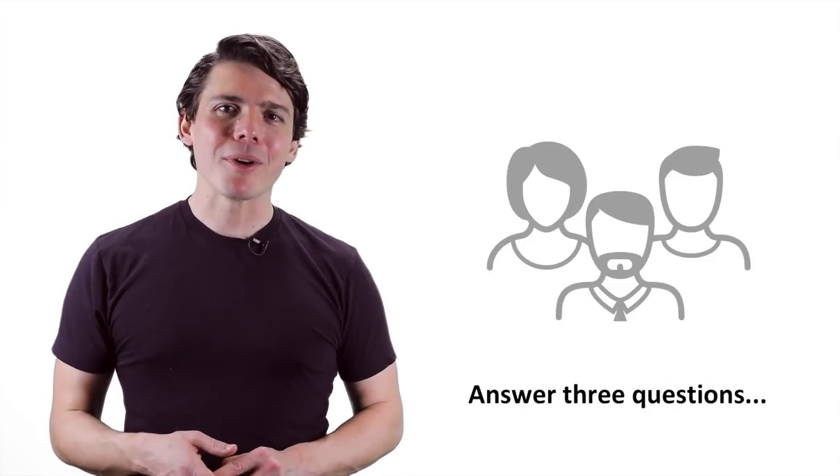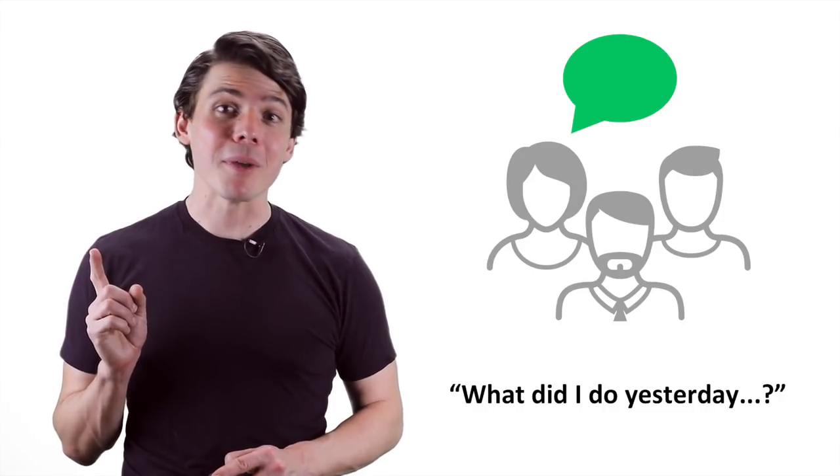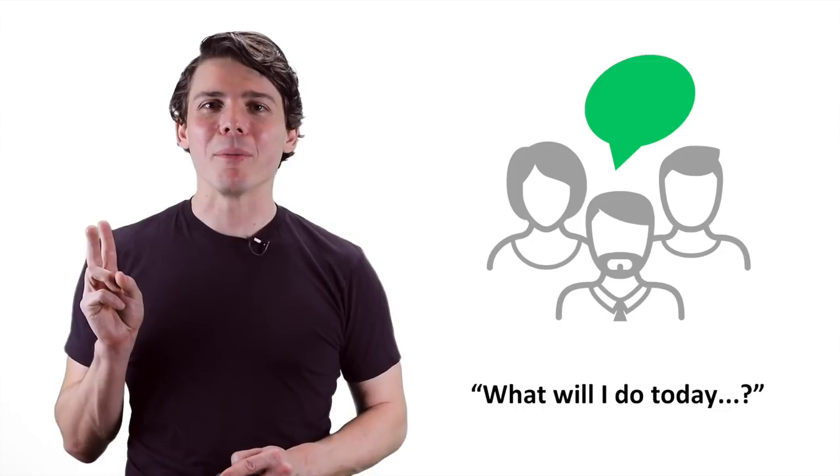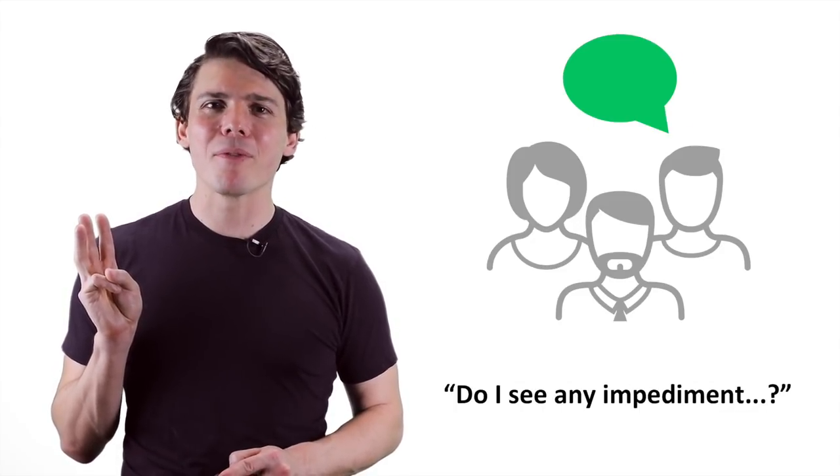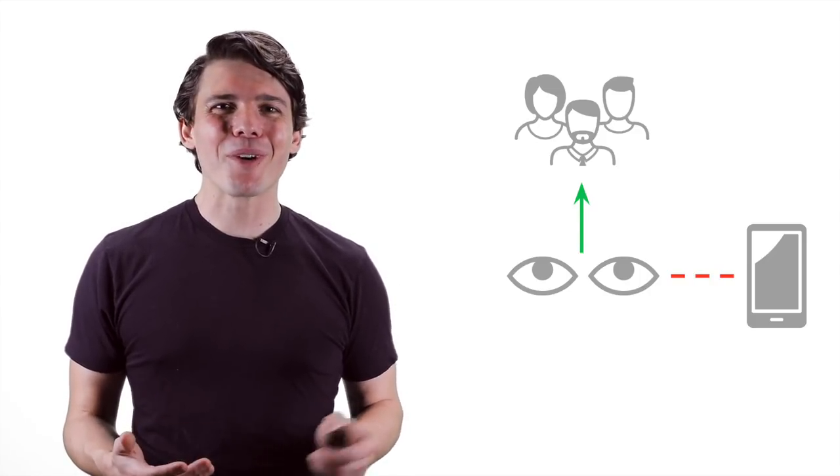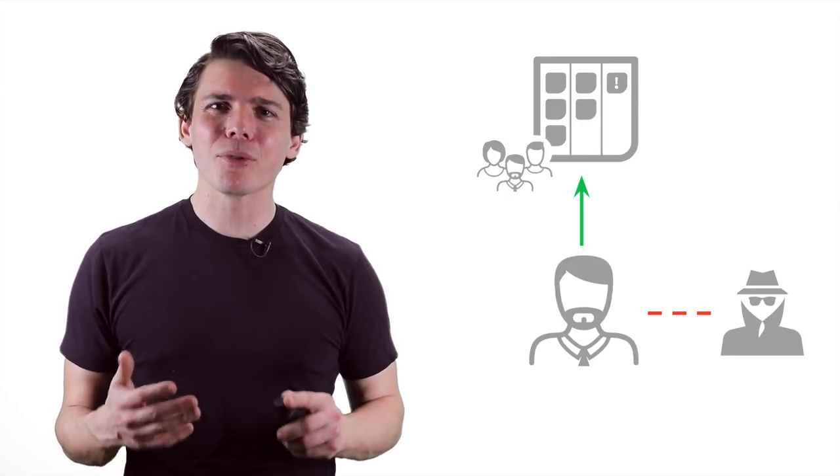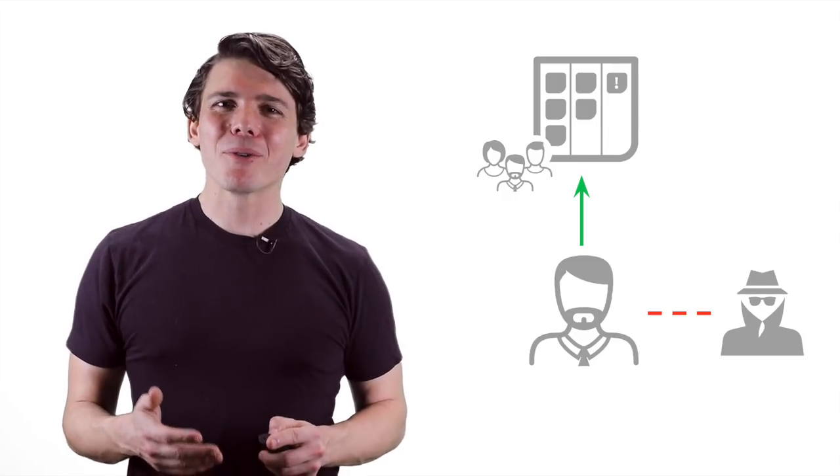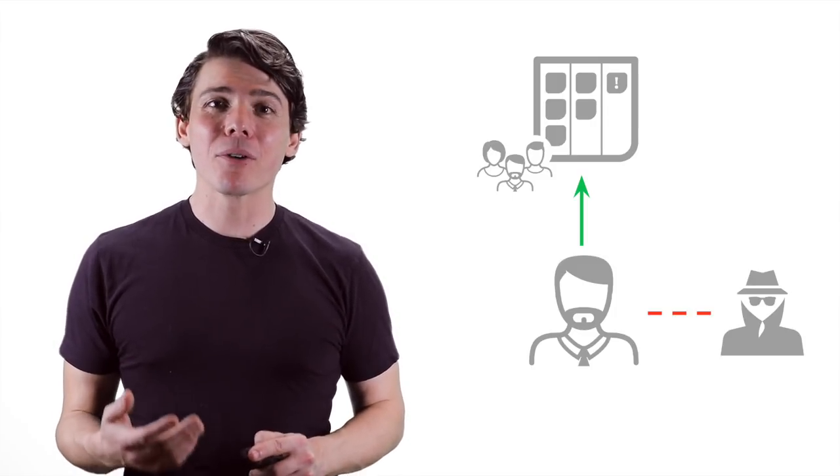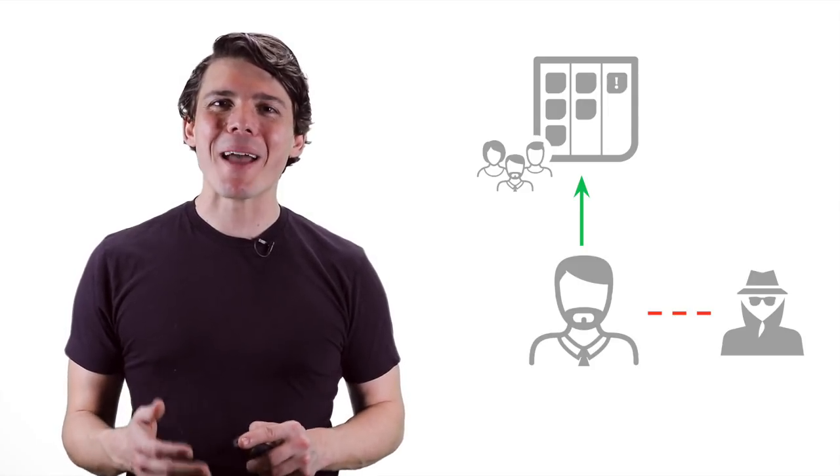Next, each development team member answers three questions right from the scrum guide as concisely as possible. What did I do yesterday that helped the development team meet the sprint goal? What will I do today to help the development team meet the sprint goal? And do I see any impediments that prevent me or the development team from meeting the sprint goal? As a member of the development team is speaking, watch out for the following. First, is everyone else looking directly at the person speaking and paying full attention? It can be a fun game for the speaker to look for anyone who isn't paying attention and nominate them as the next speaker. Second, are they speaking directly to tasks that are visible to the whole team on the board or are they working on something else? I once had a mentor who told me that we should consider any effort towards work not on the board as an act of sedition because it deeply impacts the product owner's ability to support the team and saps the team of velocity made good against the sprint goal.